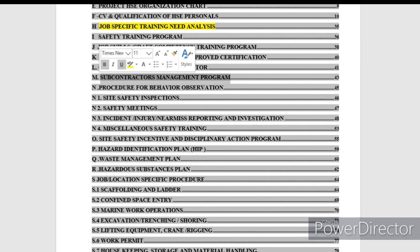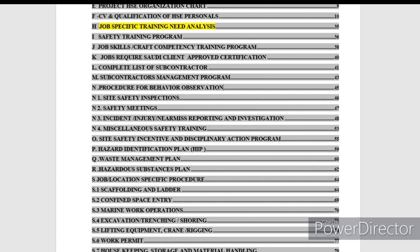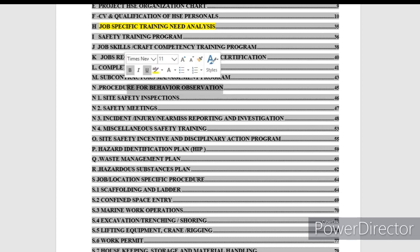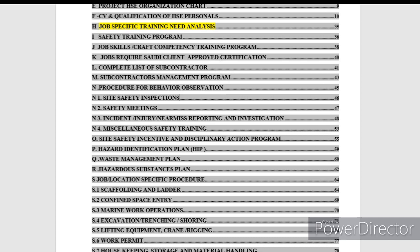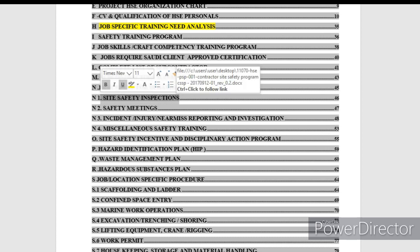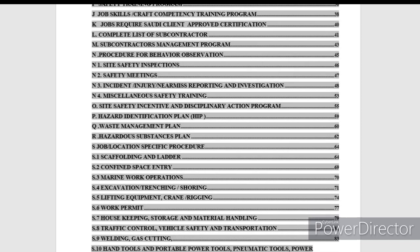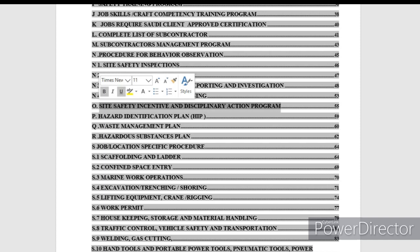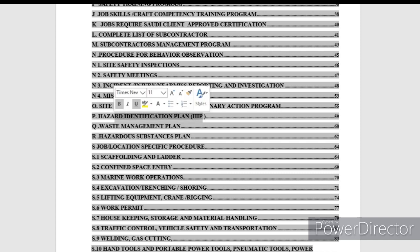The content also covers: list of subcontractors and subcontractor management programs — how to handle subcontractors on site. Then behavioral observations — behavior-based safety observation during site monitoring. Site inspection and safety inspection procedures. Safety meetings and method statements. Incident investigation procedures. Miscellaneous safety training and additional external training. Site incentive and discipline reaction programs — safety awards, warnings, and discipline reactions. These are all topics the company addresses in the safety plan.